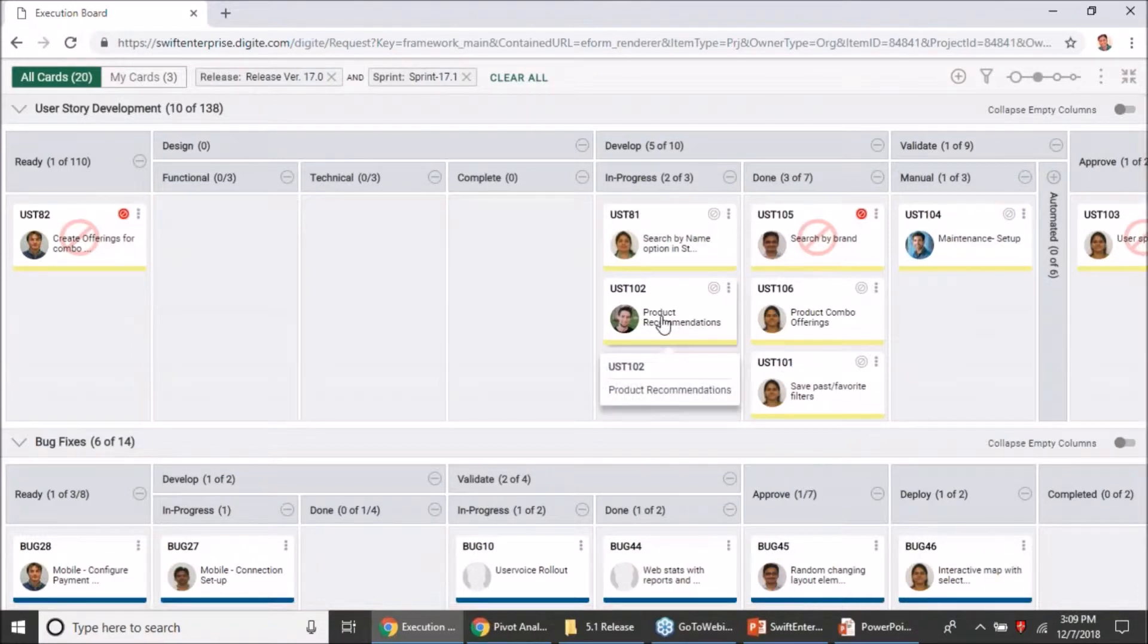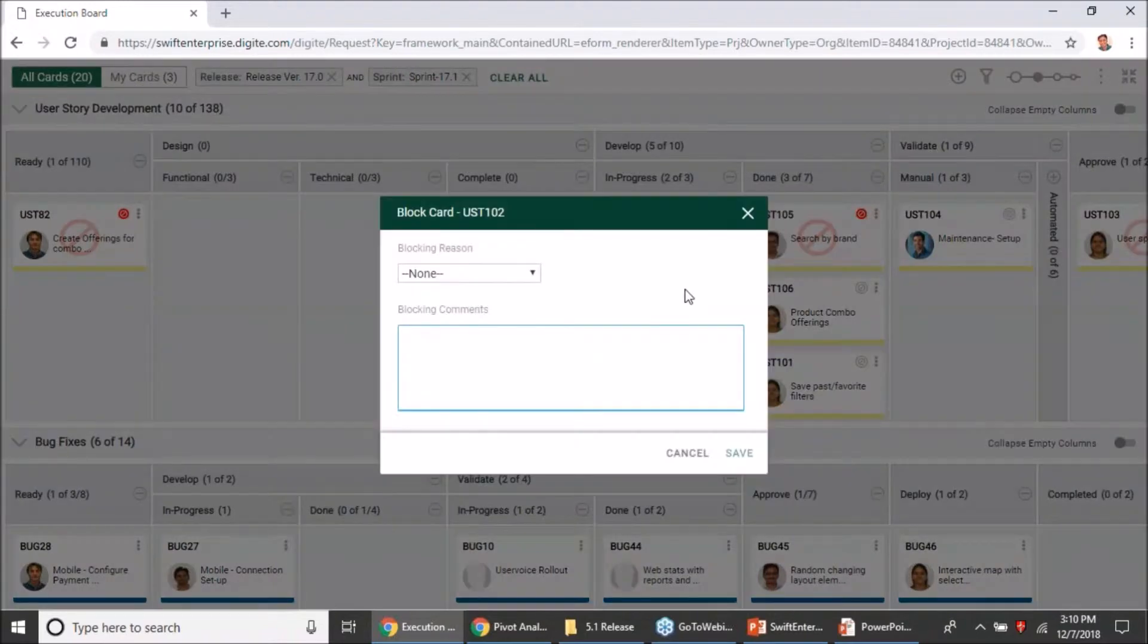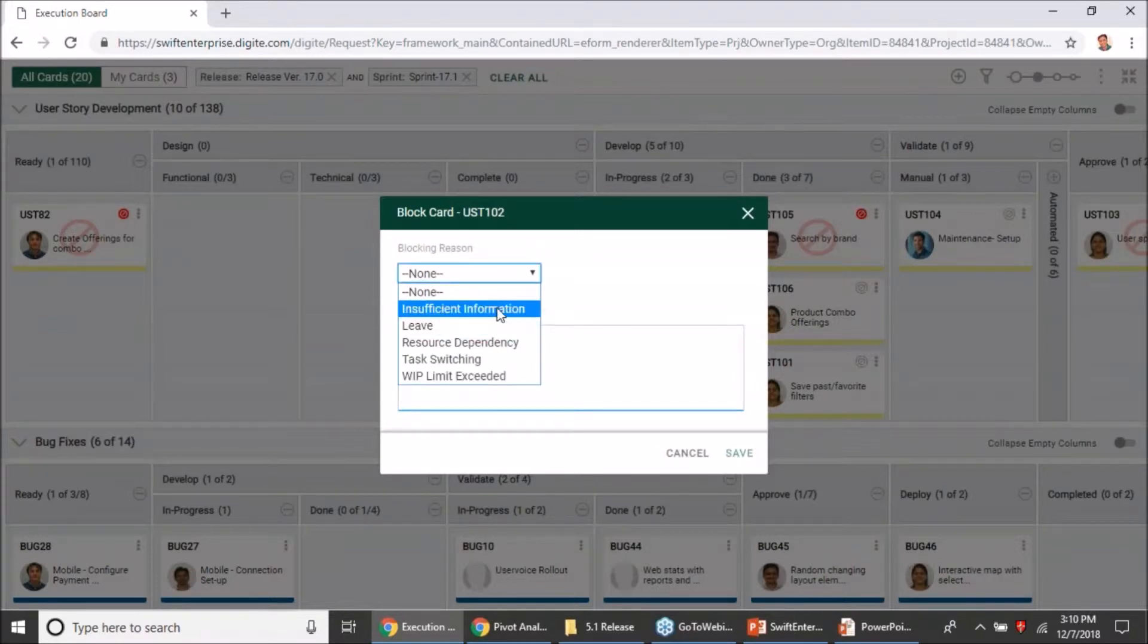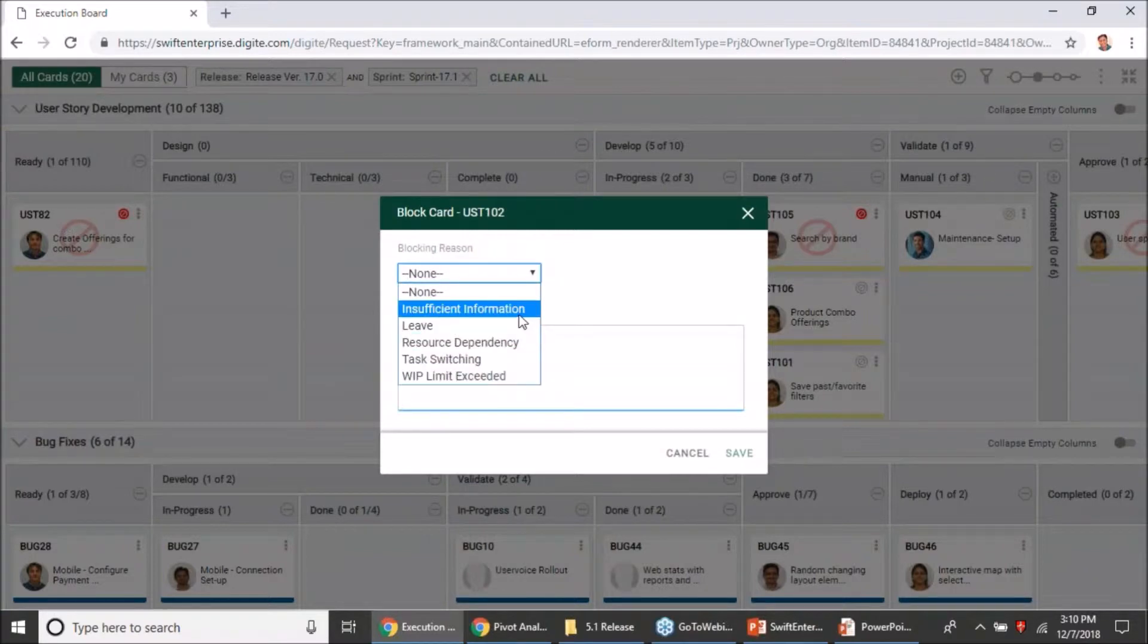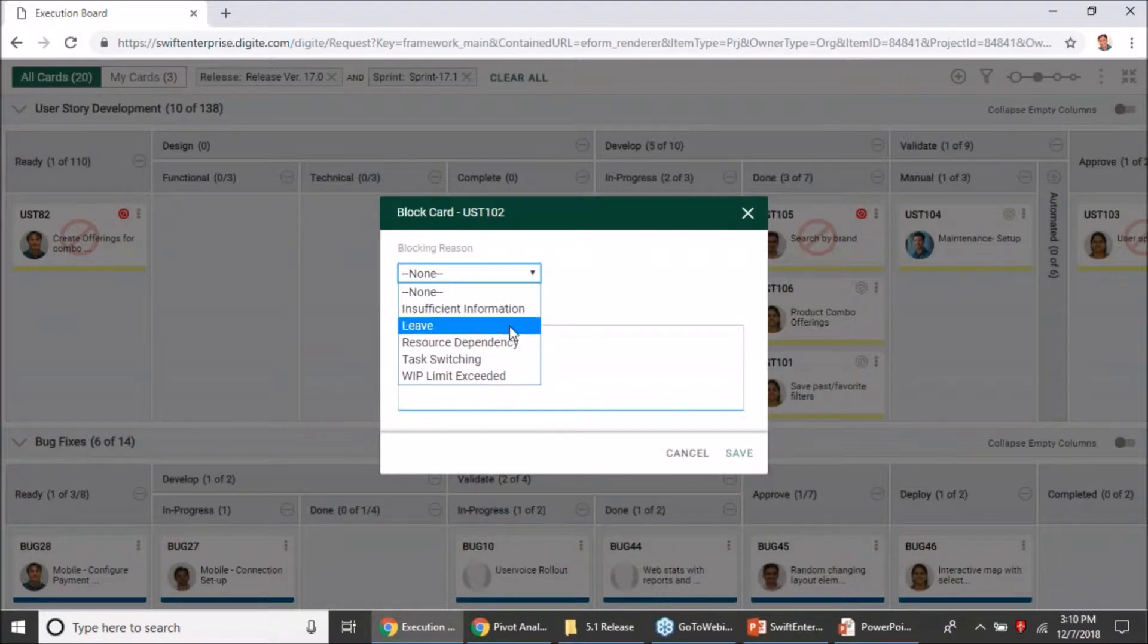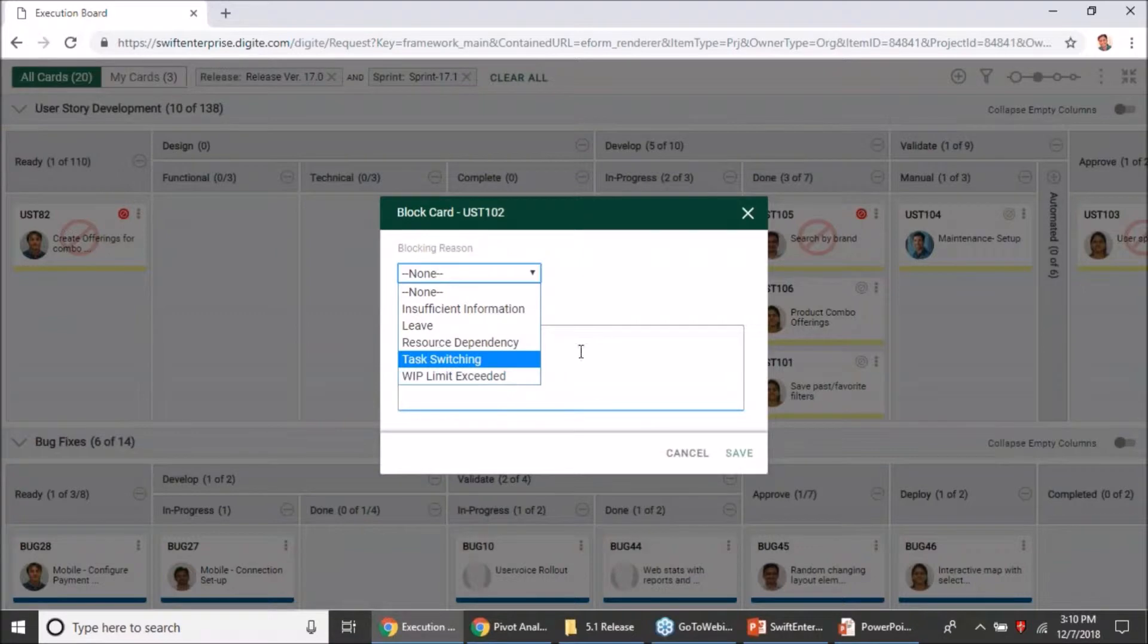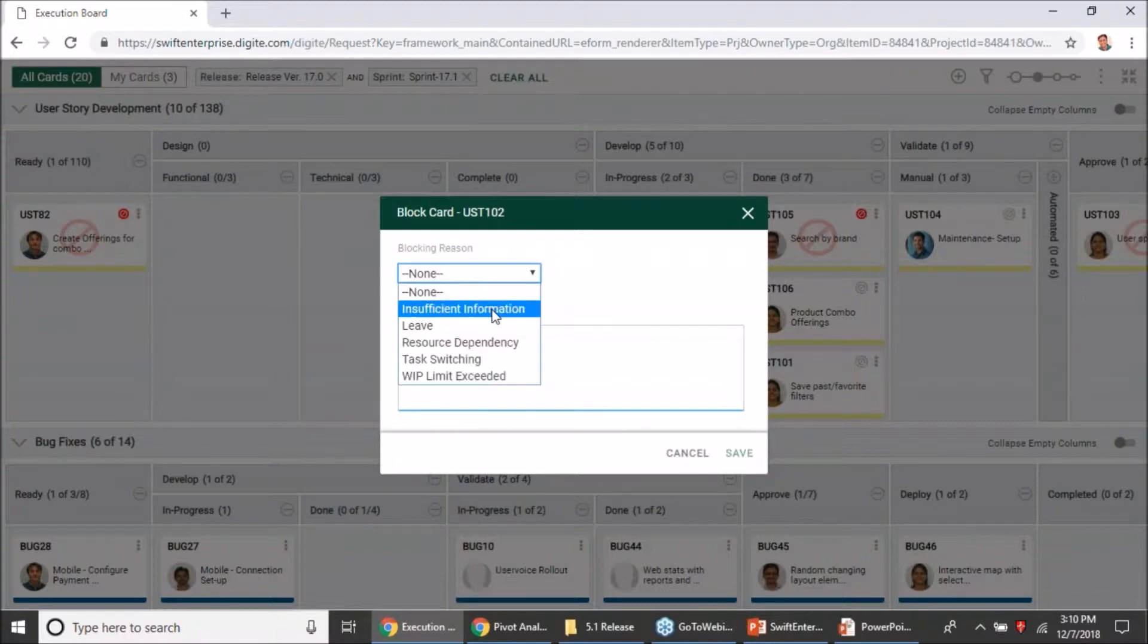So just to demonstrate how that works, let me click on the block icon. What you will see as part of the update in this release is that along with your blocking comments, you can now also select a blocking reason. We have shipped it with some predefined values which are typically the reasons why a card gets blocked: insufficient information, person is on leave, resource dependency, task switching, or if you have a WIP limit set. Depending on all these reasons, you can decide whether the card can be blocked or not.